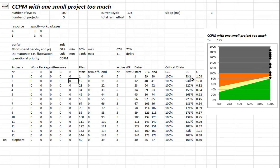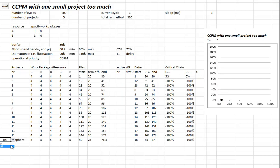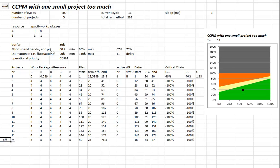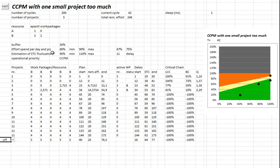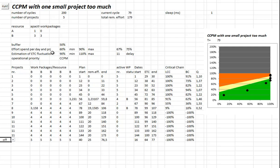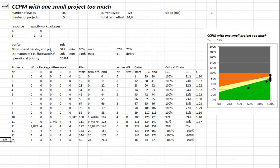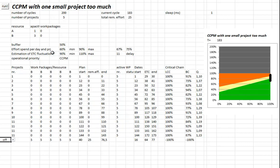That's the first question answered: what happens if in a smoothly, very well-staggered portfolio one additional project occurs? Even if it's not a very big project, just a standard project, it has a lot of impact on the whole portfolio. If you remove the elephant out of the portfolio, you have a completely different picture. The projects walk smoothly to the right upper corner, no big deviations, very predictable. That's a stable portfolio.